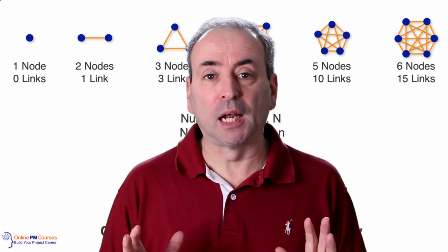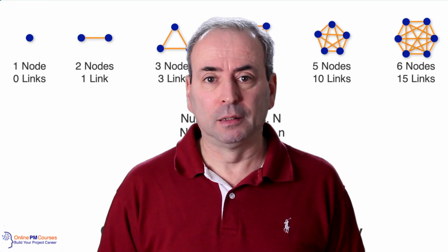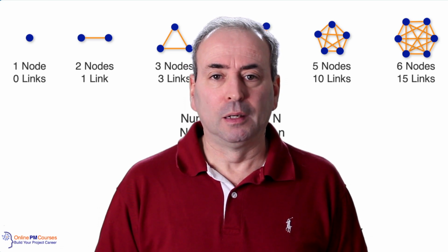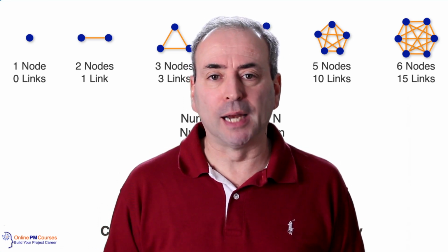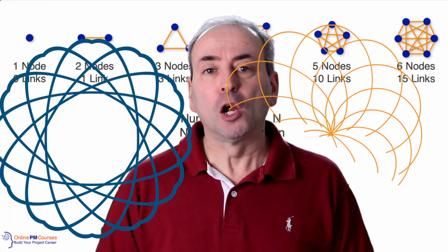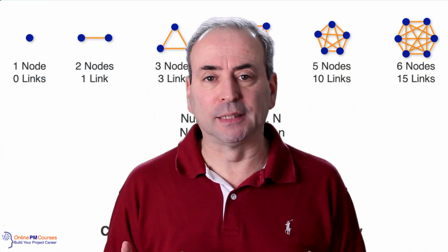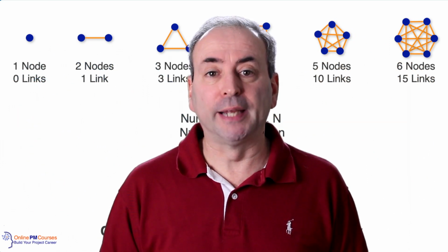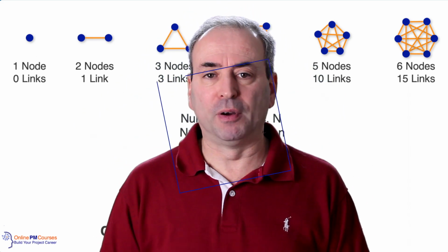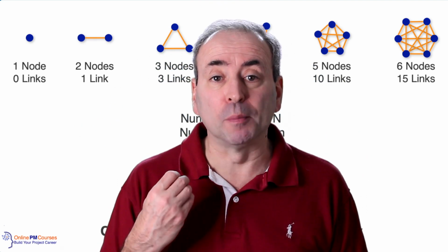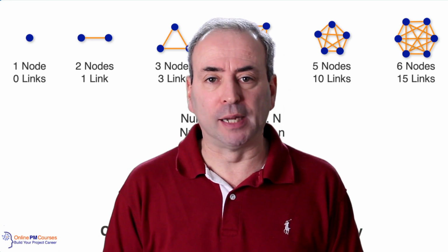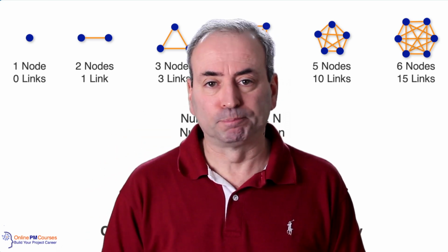And yet, if you were to cut your project into 2 pieces, the overall complexity would drop massively, because you've now got 2 half-size projects, and the points of communication between each part of your project create far less complication and complexity than the points of communication in one bigger project. So where you can, avoid failure by dividing your big, complex and possibly unwieldy project into a number of smaller interacting projects which you could phase as well.